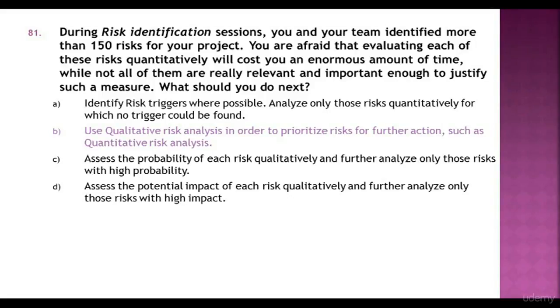Answer B is the correct choice. Use qualitative risk analysis in order to prioritize risk for further action, such as quantitative risk analysis.